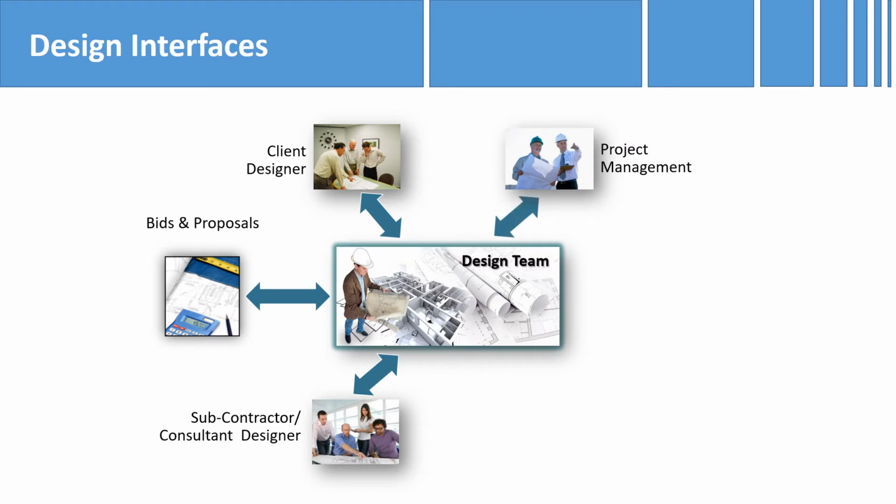Here, the designer becomes a project designer and will interface with the project on all pertinent project technical issues. The designer will need to provide the procurement team with a list of products required to meet the design specification. In some cases, this will be in the form of a bill of materials.